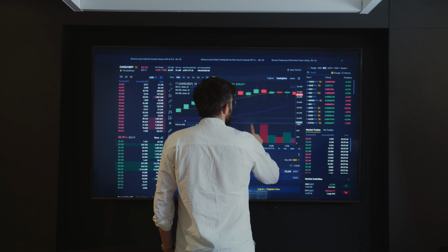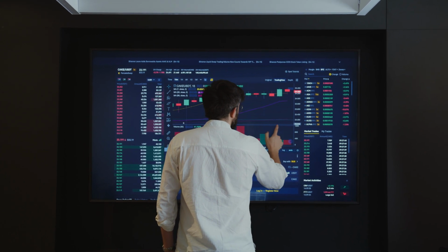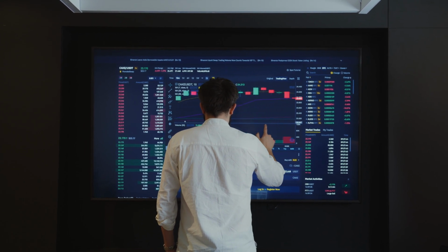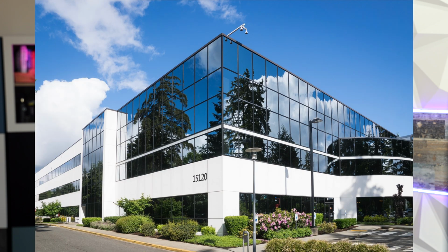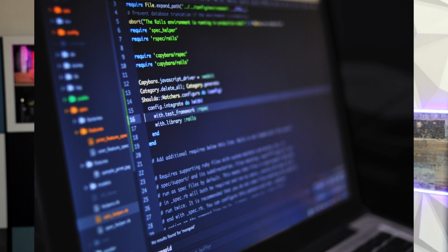Understanding whether or not your project is capitalizable, and whether or not there are pieces within your project that can be capitalized, is essential. For example, if you're working on building out an office space, much of that is going to be capitalizable. If you're creating new software from scratch, much of that is going to be capitalizable because you're building something, you're making something.